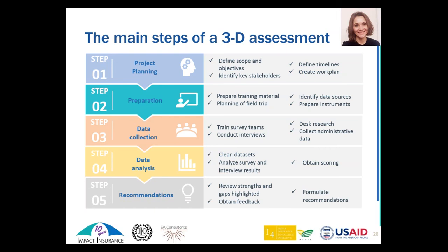Second phase is preparation, and this one is also a very important phase that shouldn't be overlooked. It's the time of preparing the survey instruments, refining them, making sure they are adequate for the purpose of the evaluation, defining the areas where the assessment is going to be conducted, sampling, defining which farmers are going to be included in the analysis, and getting ready for a field trip.